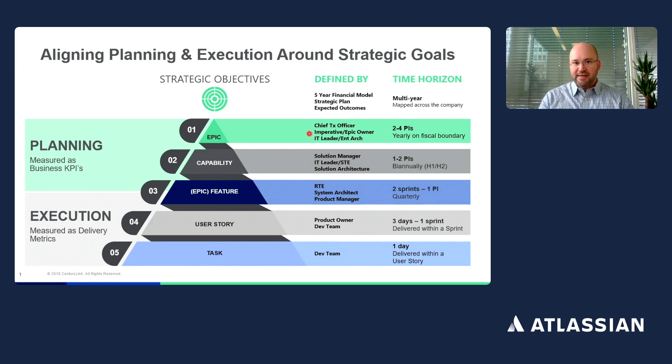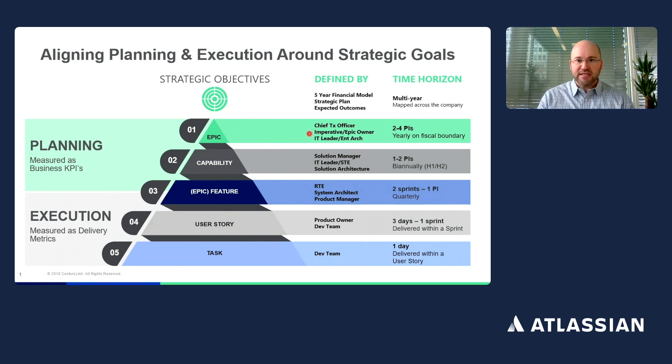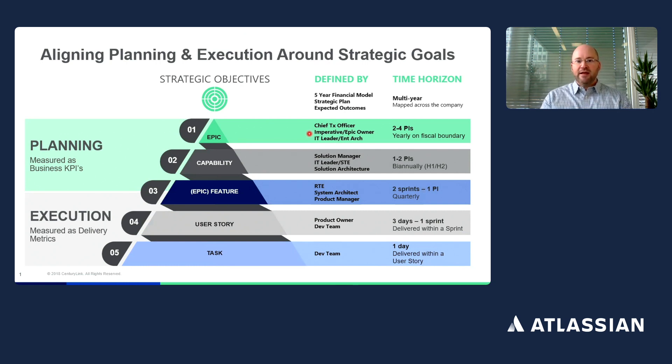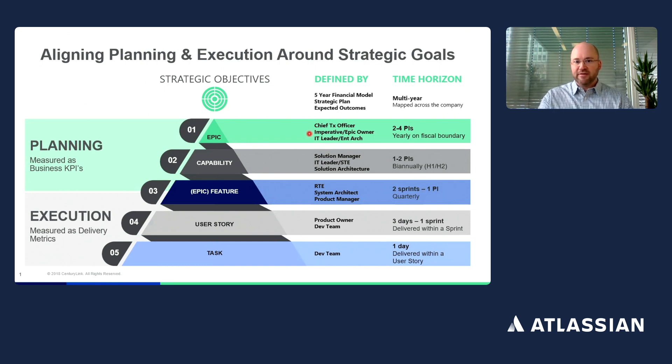During that 90-day cadence, we use a two-week sprint. During those sprint planning sessions, the teams are aligning around consistent terminology about their capabilities, their features, their user stories that they're planning to deliver.